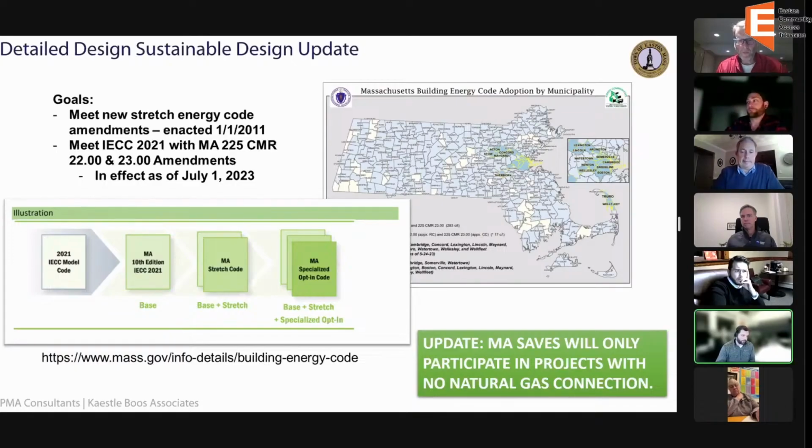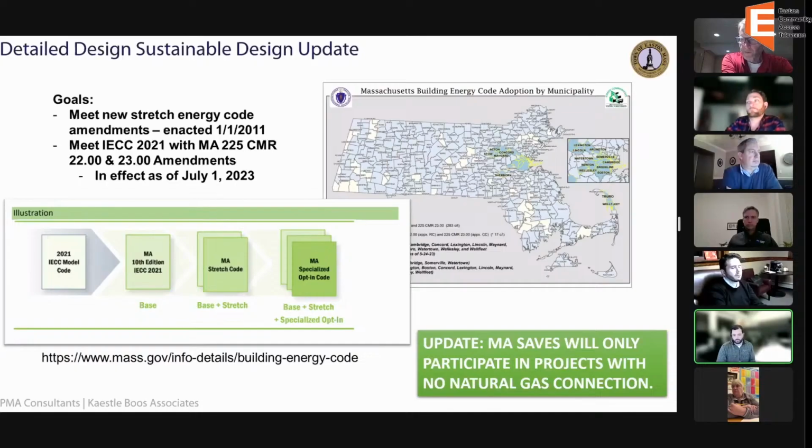Yeah, it's a fair point. It's not a right or a wrong answer necessarily. We make a judgment on what we think is the best approach by project. And here, given the complexity of the project and how many things are going on and the likely cost, we thought it was pertinent to have that information up front. So we didn't carry a large contingency of wells in theory and then scale it back through construction. We wanted more accurate information up front so that we came into design with a bit more information.